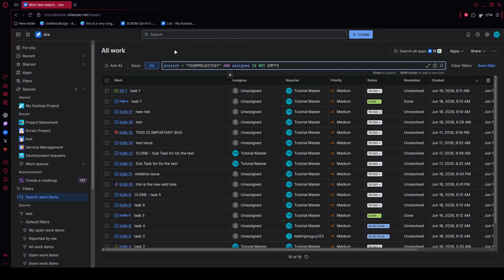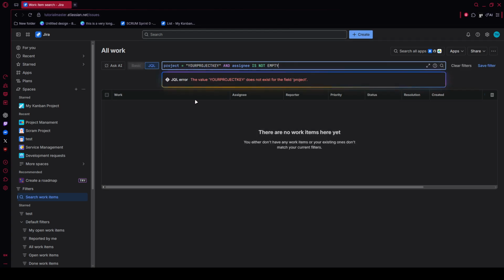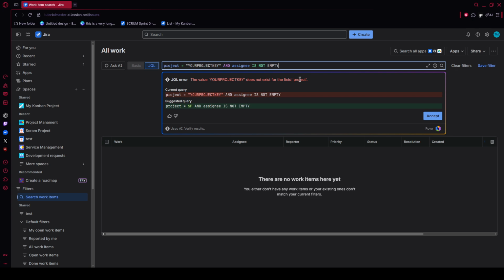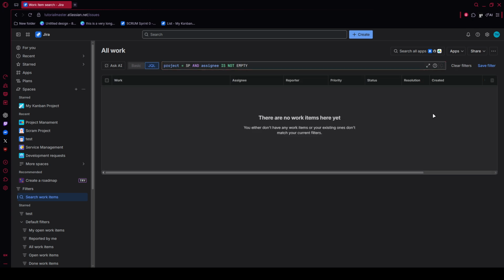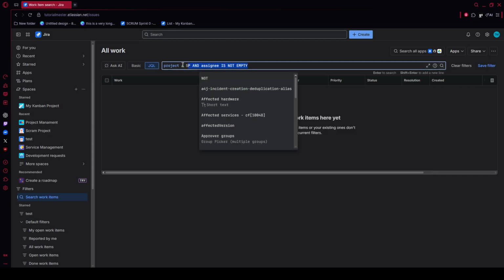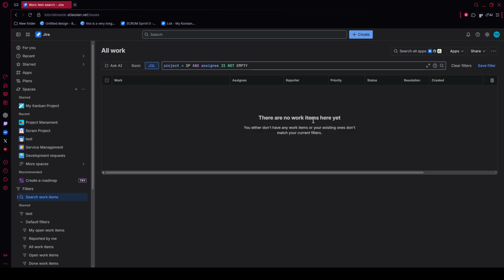And if you want a more targeted result, you can narrow the search to a specific type of relationship. Replace the query with project = your project key and issue in hasLinkType("blocks"). This version focuses only on issues that use the blocks relationship, which is especially helpful when you want to review blockers affecting delivery.